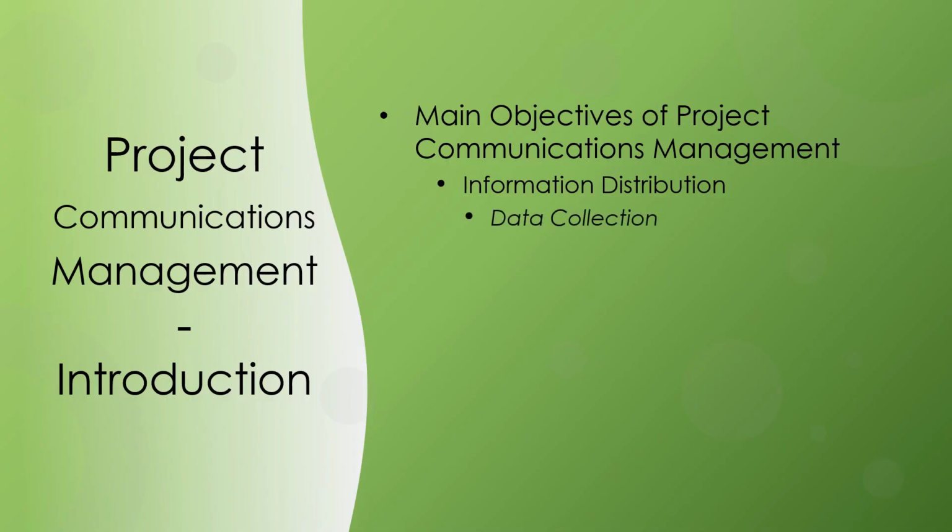Effective communication requires a robust data collection process. Project managers need to gather data on project progress, milestones achieved, challenges encountered, and any changes in scope or schedule. This data forms the basis of project communication. Once data is collected, it needs to be transformed into meaningful information for various stakeholders. This might involve creating reports, visualizations, or other formats that make it easier for stakeholders to understand the project's status.